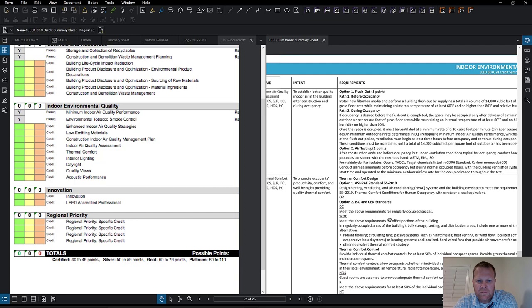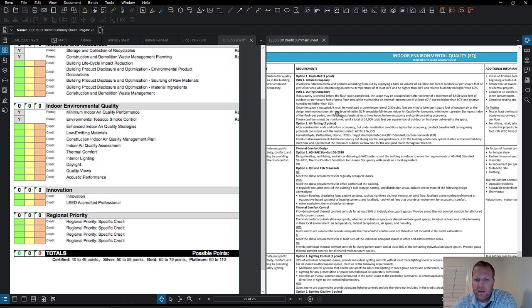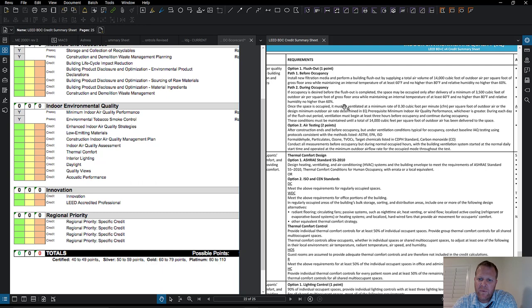There's also an indoor air quality assessment — you can do a flush-out before or during occupancy to get rid of any VOCs or construction dust that remain before people move in.